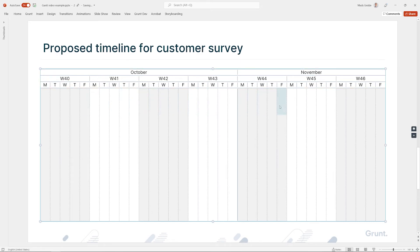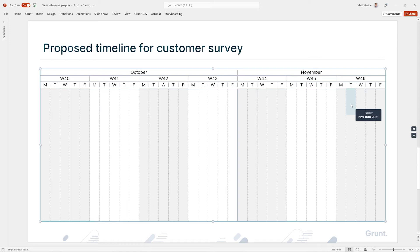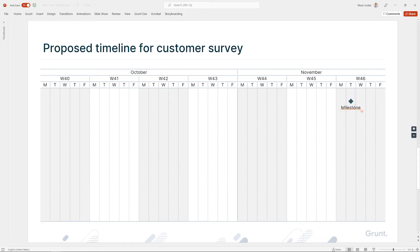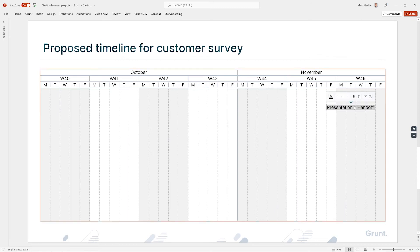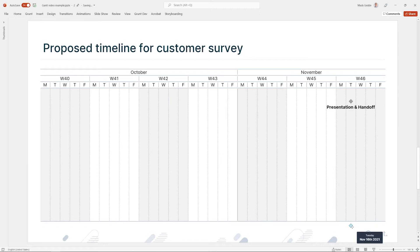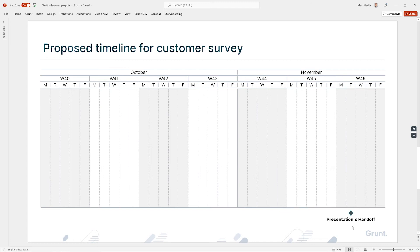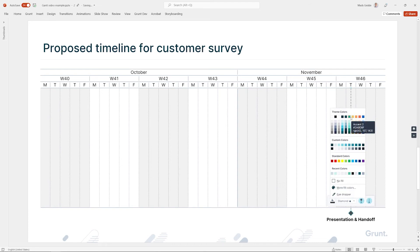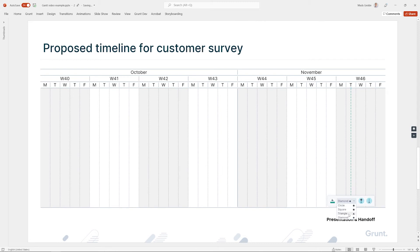Now let's add our timeline. My objective is to showcase the required steps to execute a survey among clients. I have a deadline I need to hit, so the first thing I'll do is add a milestone. I can add elements to my timeline by left-clicking and choosing the appropriate element from the menu. This is going to be named 'Presentation and Handoff' and I want it to be bold. Since this is a global milestone, I want to display it beneath my Gantt chart rather than in a specific swim lane. I can simply grab the milestone and drag it down to the bottom of the chart — this will turn the global lane on. If I select the milestone, I can also choose to display a line across my chart and change the color to a green shade. I think I also want a different shape for this milestone, and I can choose that from the drop-down.